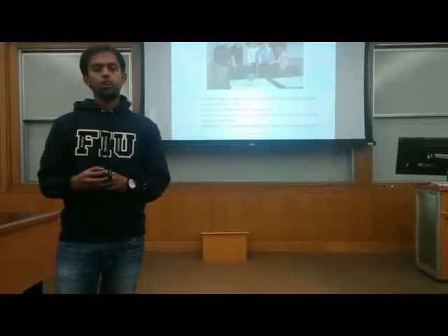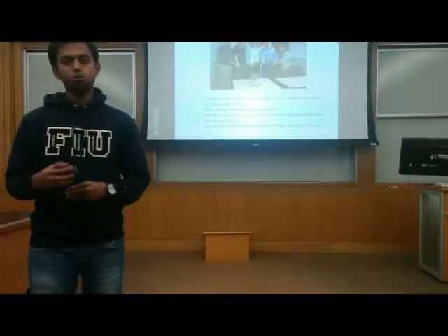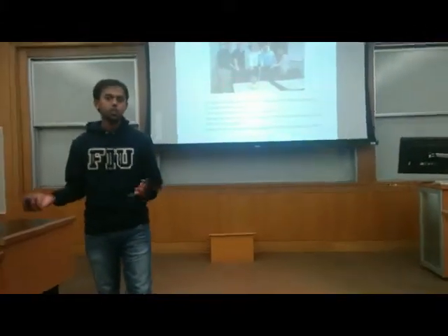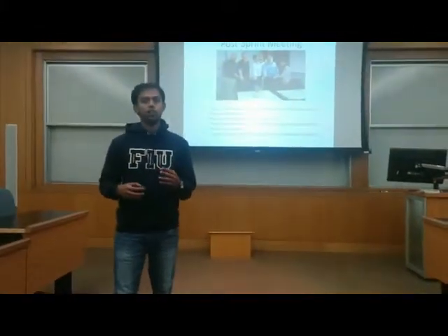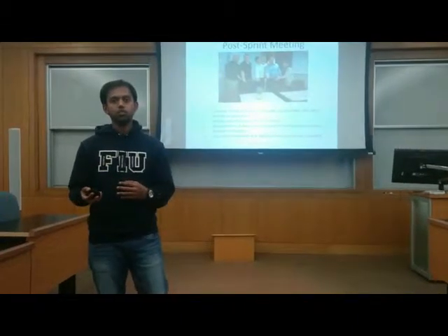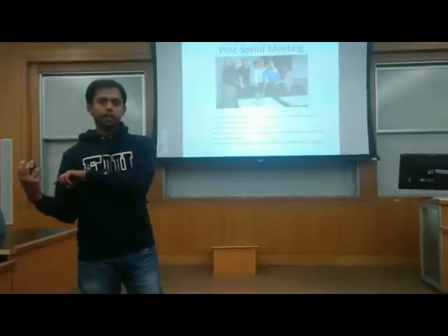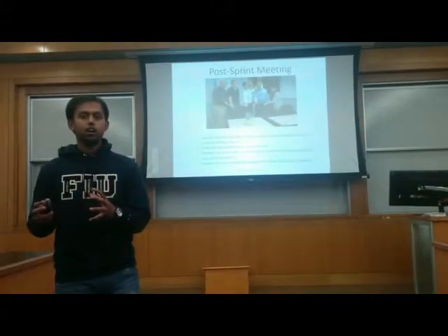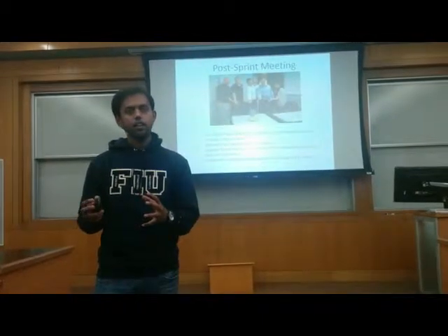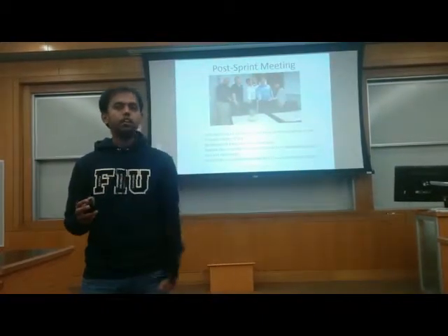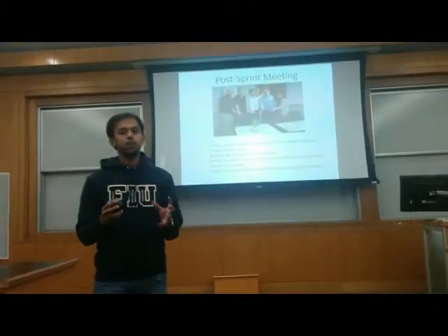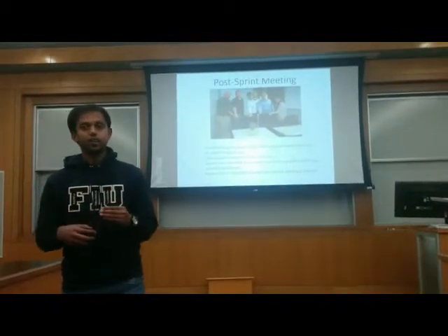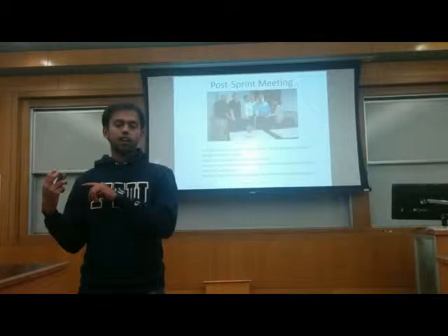The product owner's role here would be, when he gets an update about the user stories which are completed, and when he gets an update about the user stories which are not completed, he's going to take a call whether the incomplete user stories should go back to the product backlog again. If he feels that a particular user story is not important, or not necessary, he can just throw the feature off, and go with the two user stories which are already ready. If he feels it's a very important feature, he has to go back and update the product backlog.